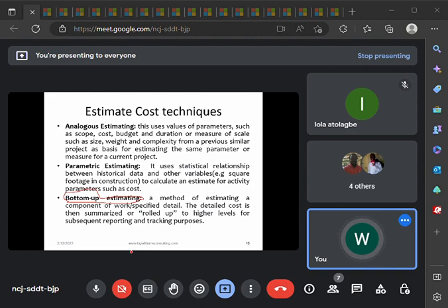All right. The concept of the bottom-up estimation is actually that concept where you estimate your cost from the activities that you have decomposed from the work package. We call it bottom-up. So for instance, let's go back to the foundation project again, the building project, and we are taking foundation as a work package. And under foundation, we are looking at foundation as a whole. Then under foundation, we define that there will be clearing of the land, mapping of the land, digging of the land, pouring of blind, and setting of block.